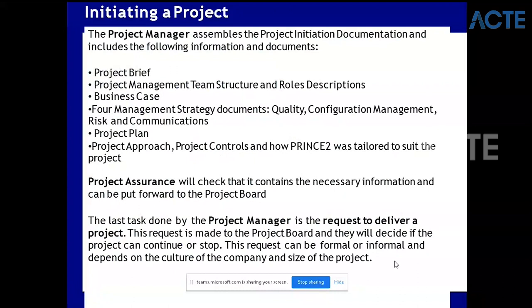Will this PID document be approved? No - it is not approved. It is something the project manager has to create and maintain. The project manager sometimes sends the PID document to business or the executive for information, but it is not to be approved - it is only for information and review, because all the contents have already been approved. But it should be there - you cannot start project initiation without a PID. Project assurance will check that it contains the necessary information and can be put forward to the project board.